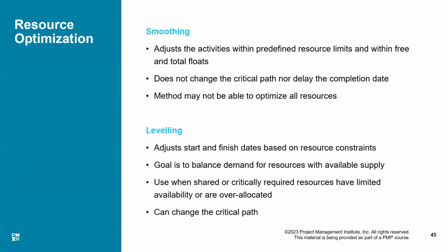Right? Another important point you have to know is, when you are developing the schedule using critical path method, you will not apply the resources. Only with the duration and the other logical relationships, you will develop a schedule. After developing the schedule using critical path method, you will apply the existing or the available resources and you will check, is this project doable within your resource constraints? If yes, that's fine. If not, you have to optimize.